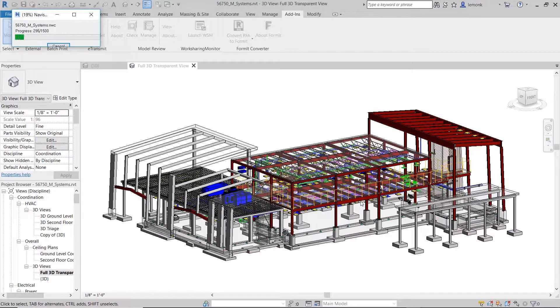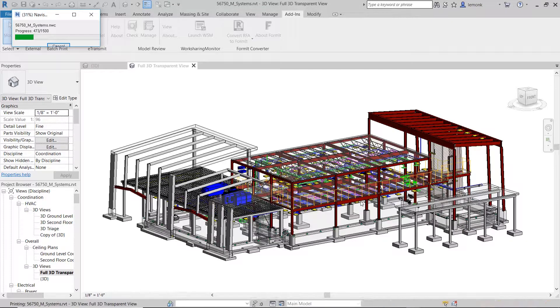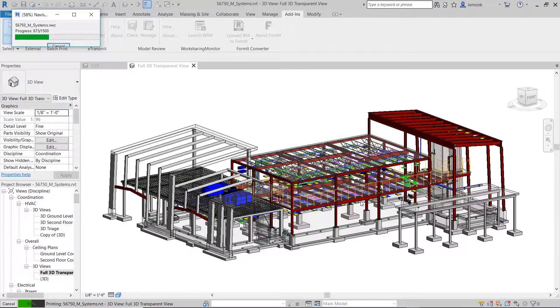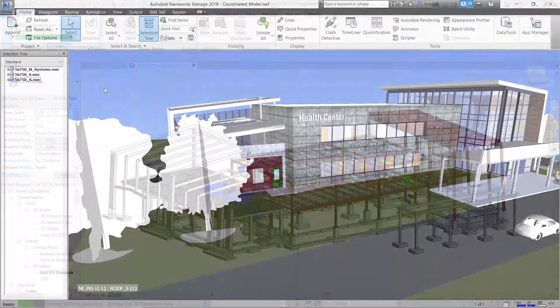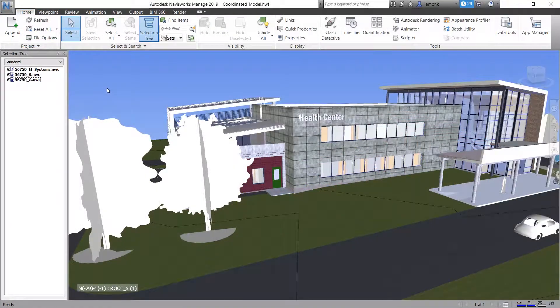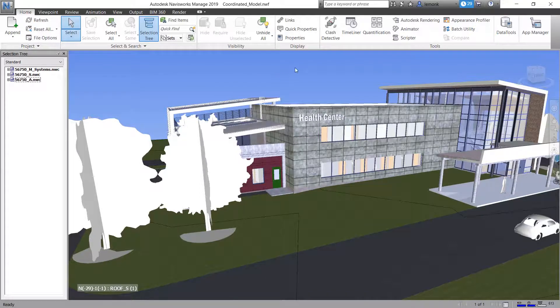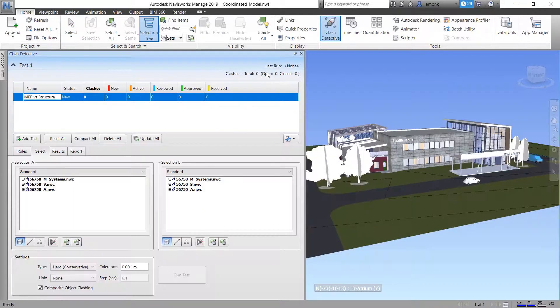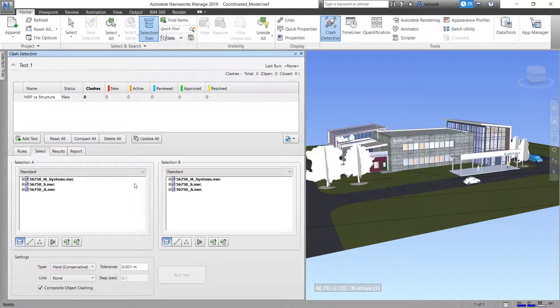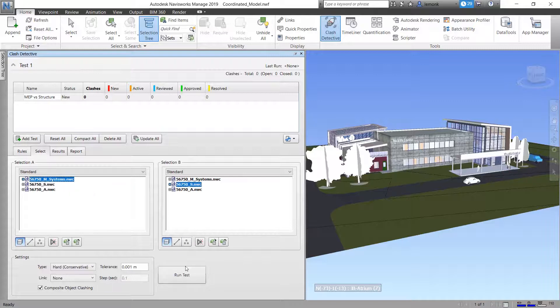In this example, the Revit models of the MEP and structural teams are downloaded from BIM 360 docs and exported directly to Navisworks, where a series of clash detection tests are done, and the results are visually highlighted and color-coded.